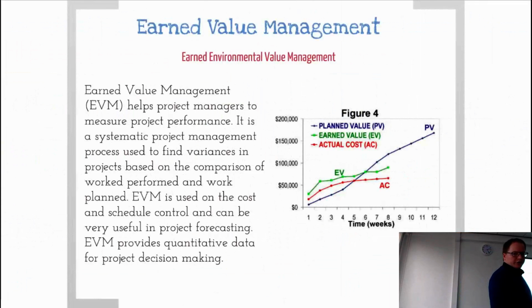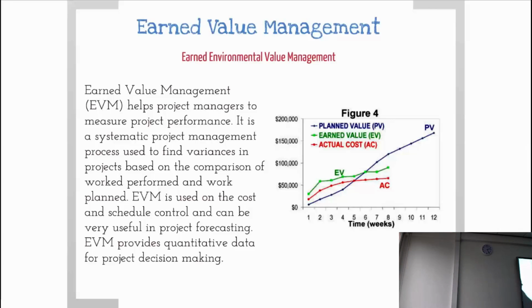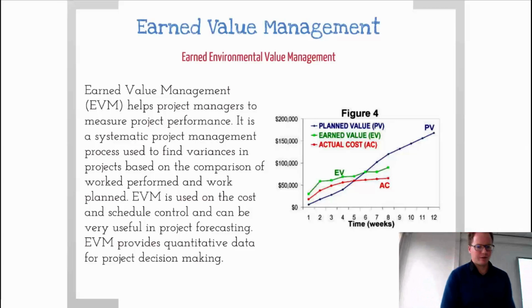Another tool which is very commonly used is earned value management, and here adapted already to earned environmental value management. This is really to help mostly the project manager to stay on track, right? So you have the planned value, earned value, actual cost against it. And then you can also justify maybe increased value with increased cost, for example, if it's actually desirable for the client or the stakeholders.